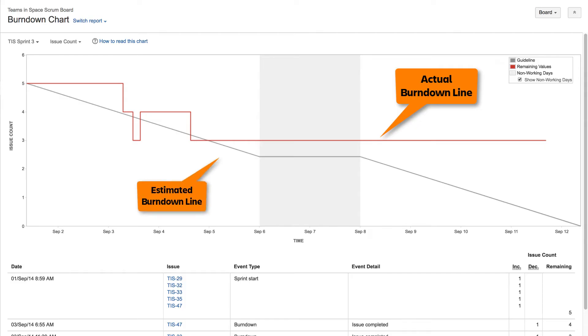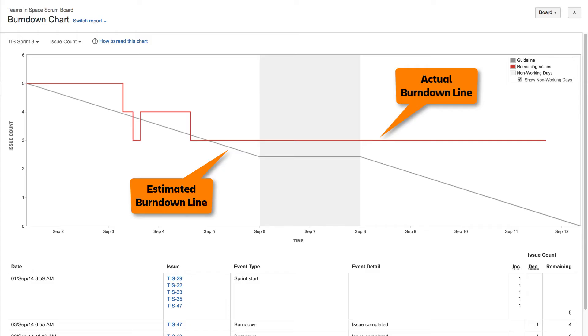The gray line represents a linear progression from the beginning to the end of the sprint. At any point in time, it indicates a projected number of issues, assuming steady progress through the sprint.